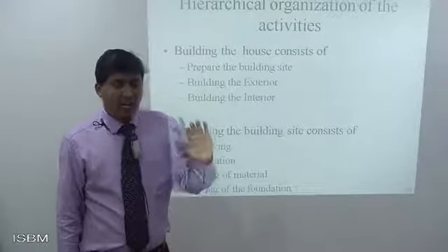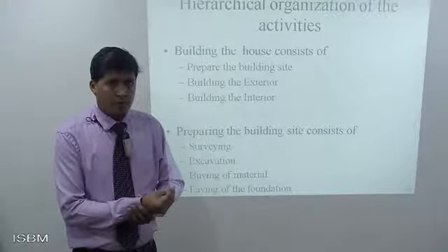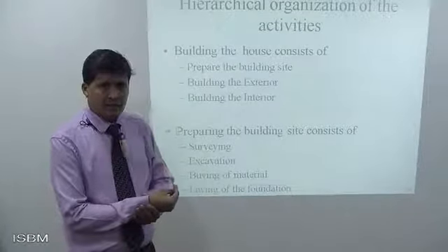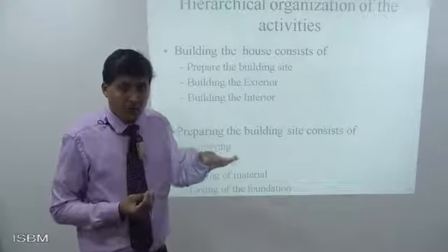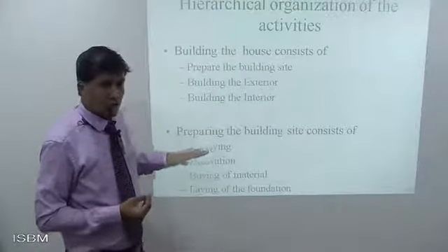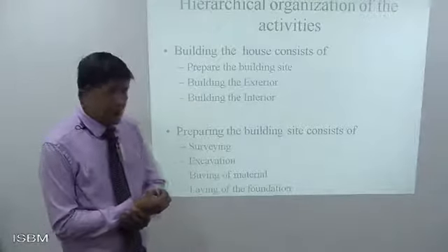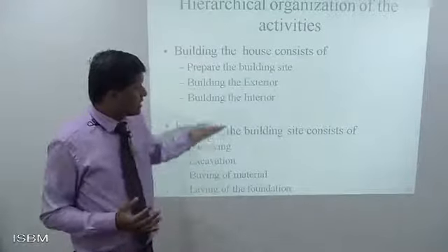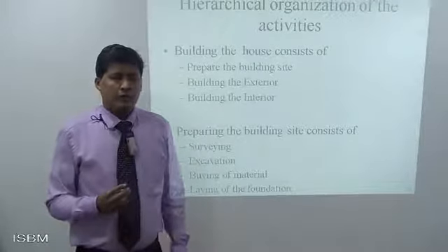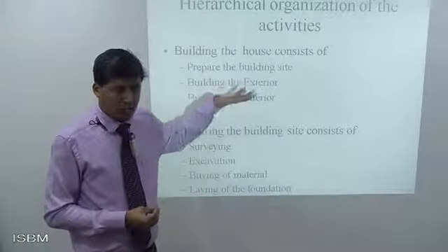Now let's look into the hierarchy of the activities. Building a house consists of preparing the building site, building the exterior, building the interior. Now we are getting into the structure and layout as well. Preparing the building site, the first one, consists of surveying, excavation, buying of material, laying of the foundation. These are the tasks, right? And these tasks will now have activities. So the work product is bifurcated into tasks, and those tasks also into activities.